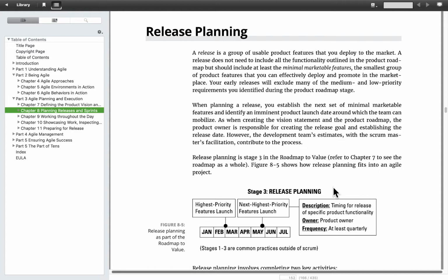And the agile people, and particularly Layton, like to talk about how agile can pay for itself. If you can take a minimal set of marketable features and release them into the field, you can start to get the benefits back from the system that starts to pay it off before you're done with the whole thing.